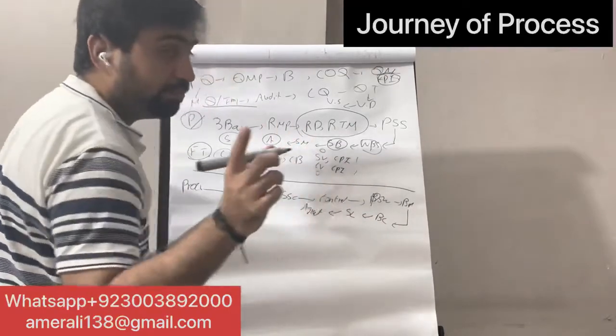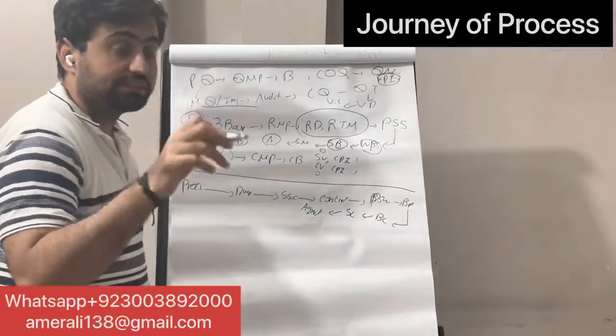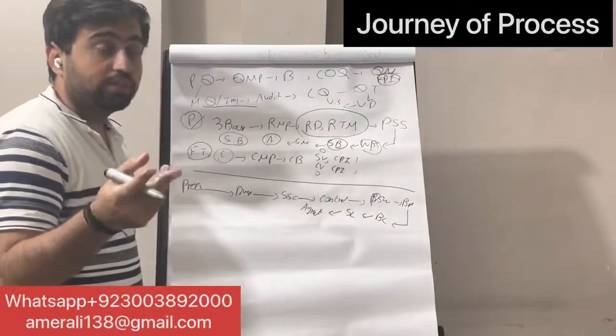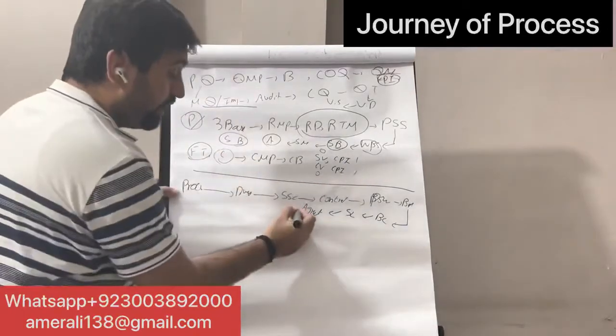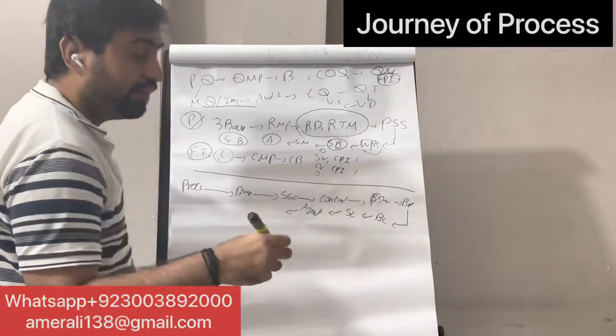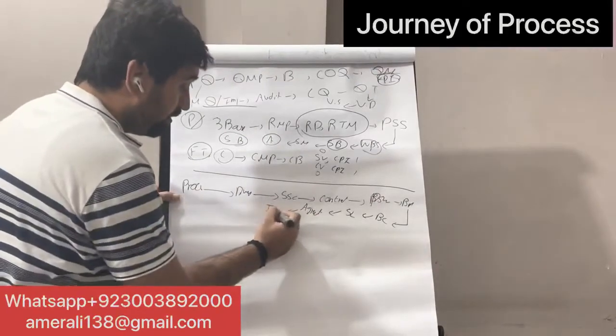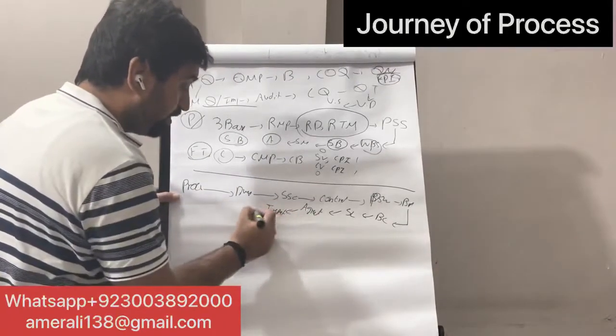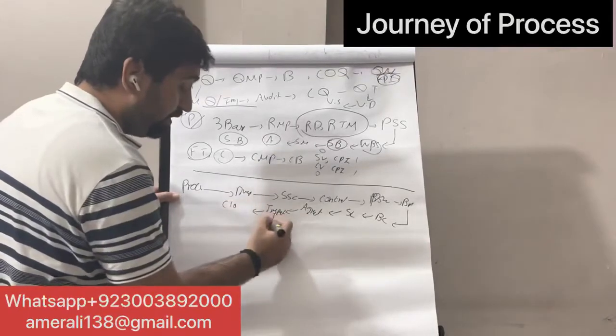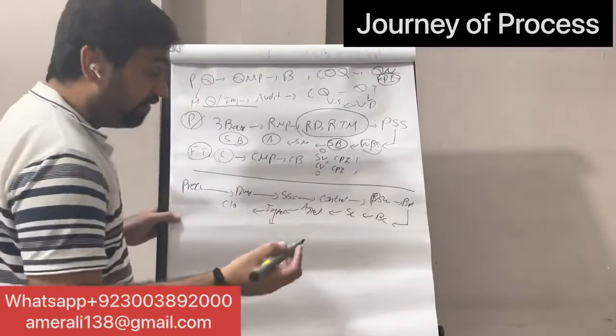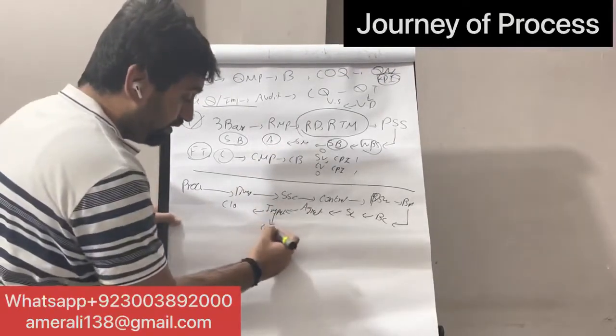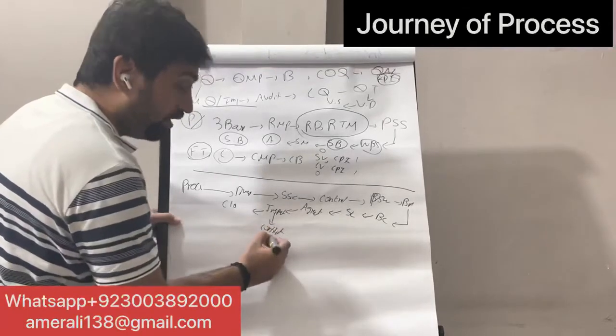Very important thing: the project manager does not discuss anything related to cost. We have a procurement manager for that. Once the agreement is done, we get the delivery. We do the inspection. If the inspection is approved, we close the procurement. If there is a problem in the deliverable, we have a conflict here. We go to conflict management.